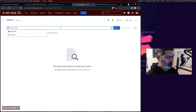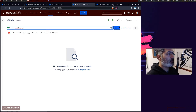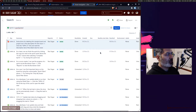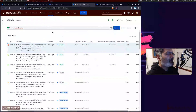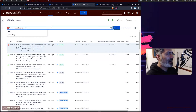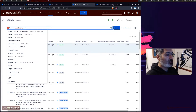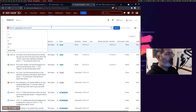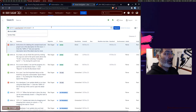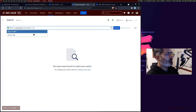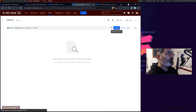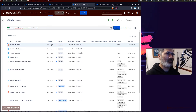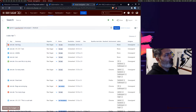If you take a look at this particular search result, this will give you issues that are in the open sprint — sprints that are running right now. You can also filter based on the project, which is Android, and then see all the issues in the open sprint for the Android project board.